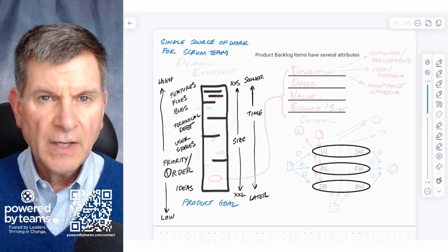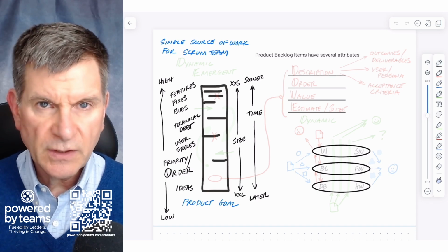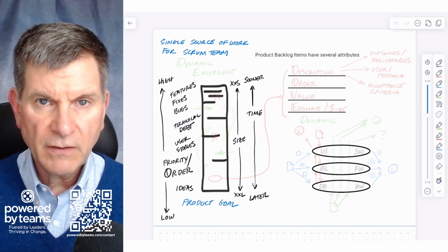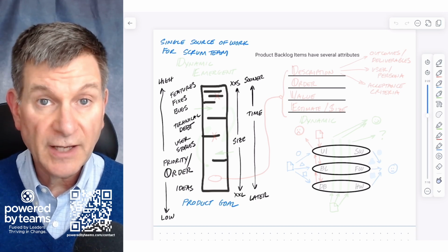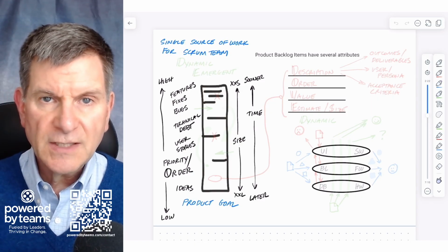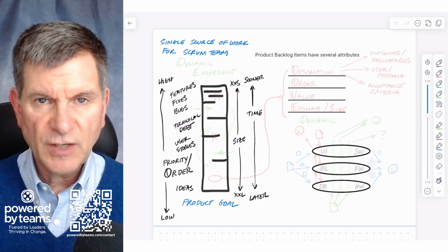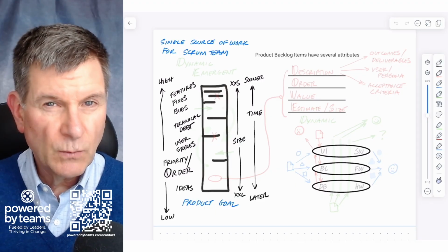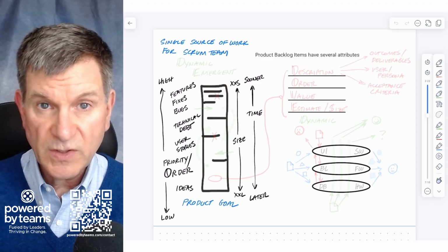The reason I say that is even if you're running a 1-month sprint, if you can get to done inside of 1 week, you can get some feedback and maybe make some course adjustments before the sprint is over. Another reason is it makes it a little simpler to do some estimation because you can go, hey, what can we do that we can fit into 1 sprint?